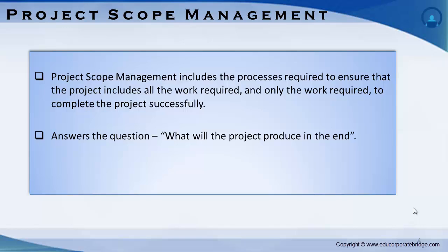For example, if a project is implementing new technology or a relatively new type of service, the requirements gathering process may take longer to complete. Prototyping, focus groups, and proof of concept work may need to be done first to establish feasibility factors before scope can be set.